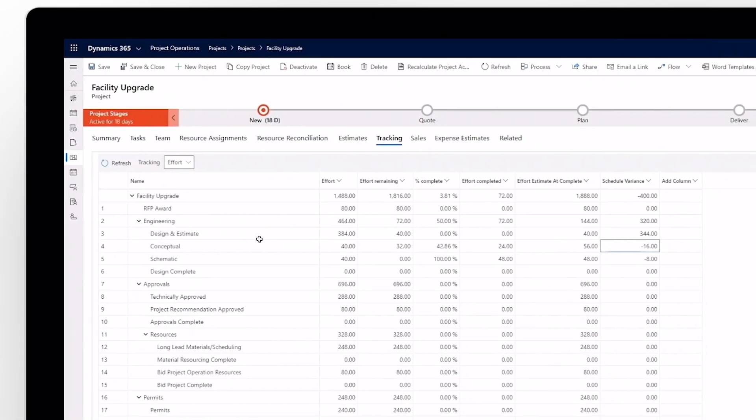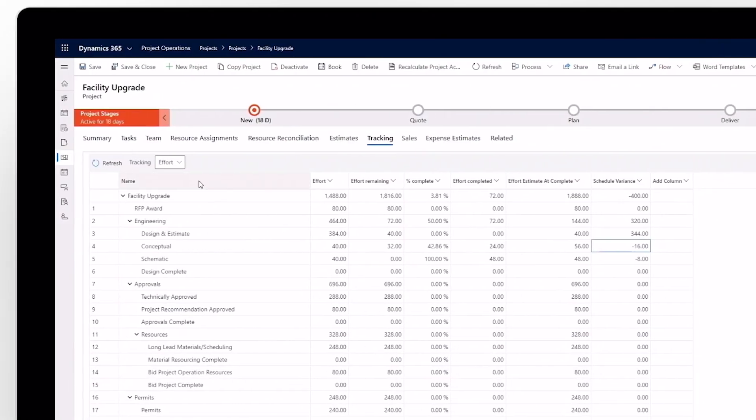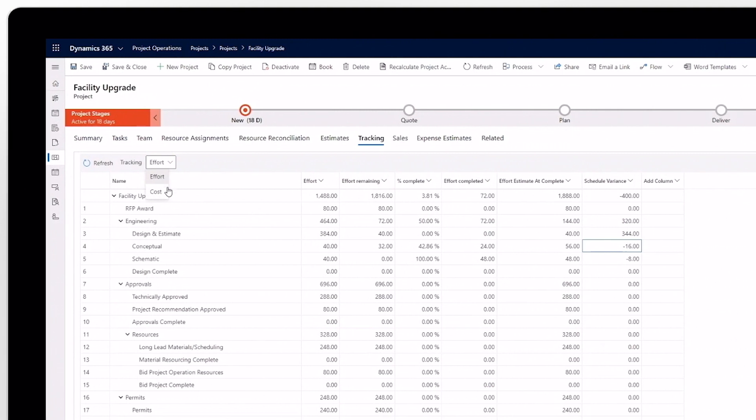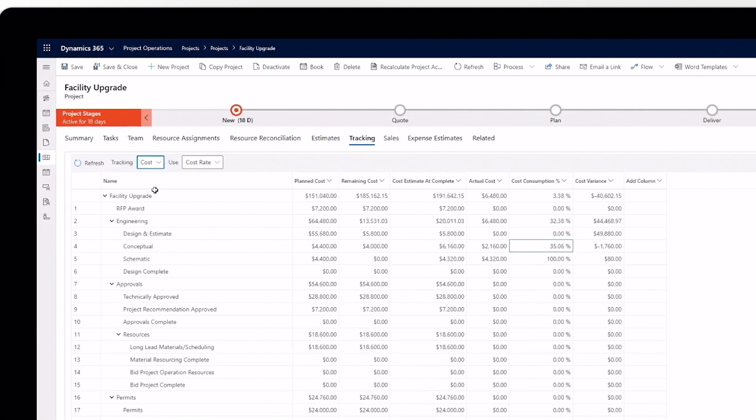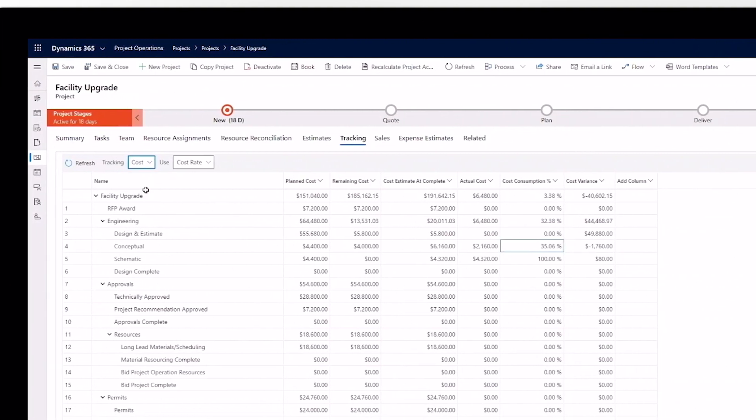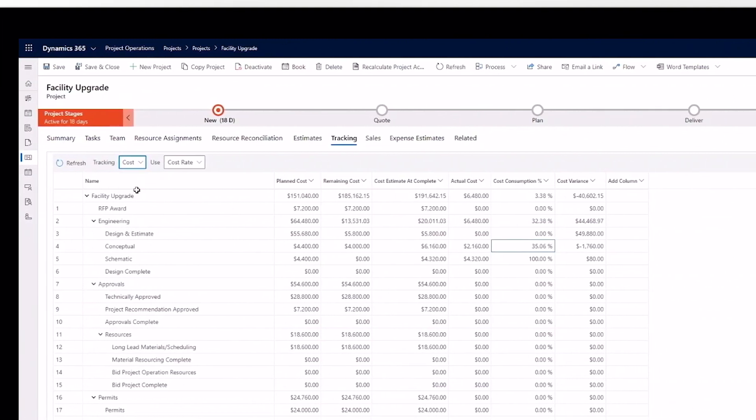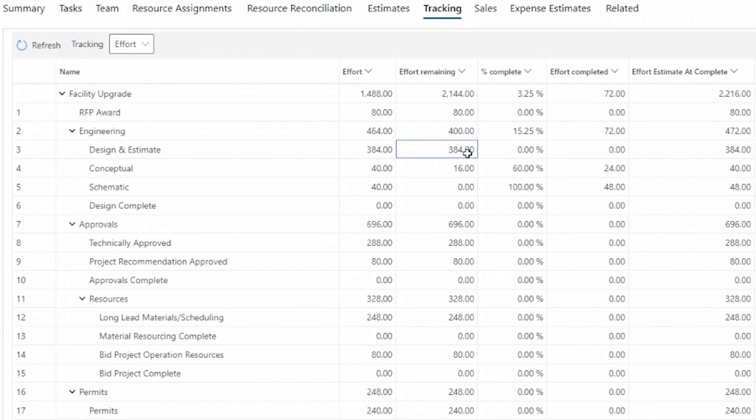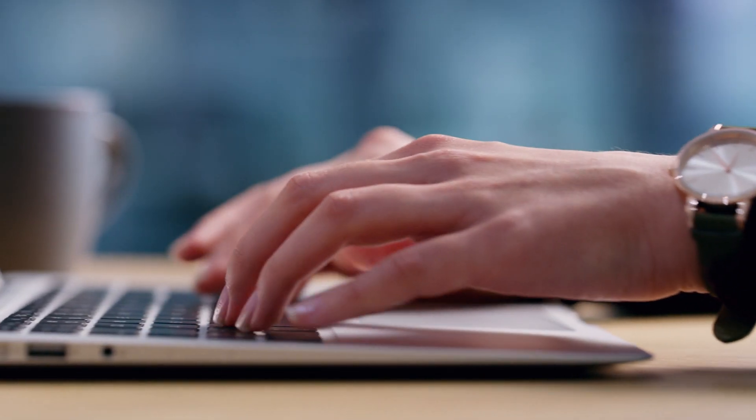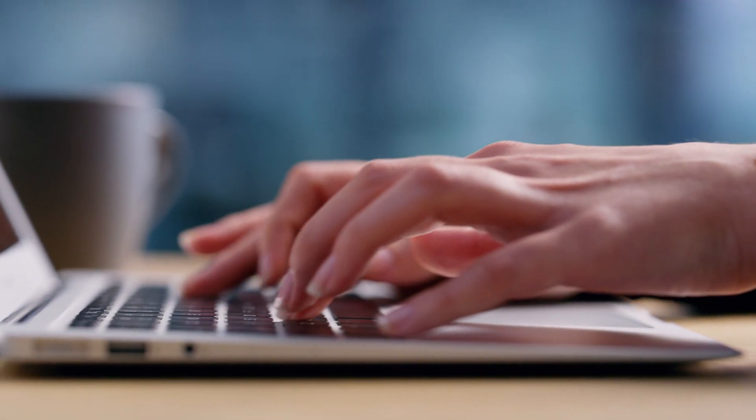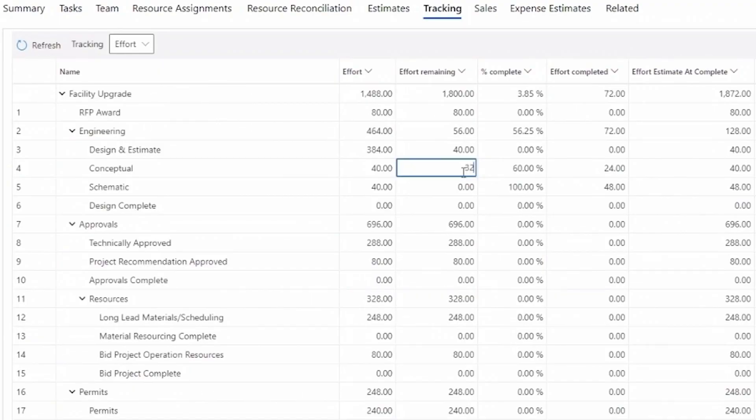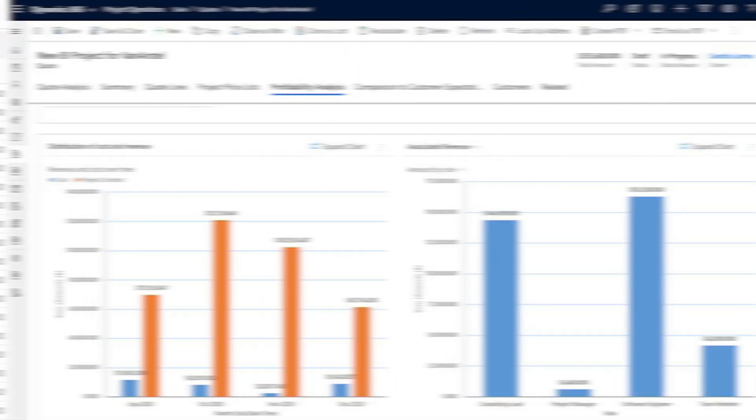After a quote is accepted and the project begins, use the tracking grid to monitor progress. Dynamics 365 Project Operations lets you edit the remaining effort on specific tasks to keep you on track with your original estimate as you approach final delivery.